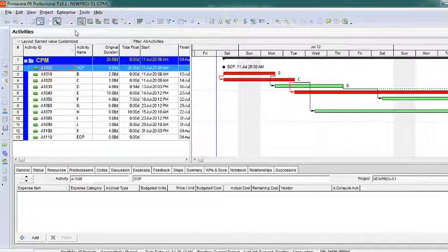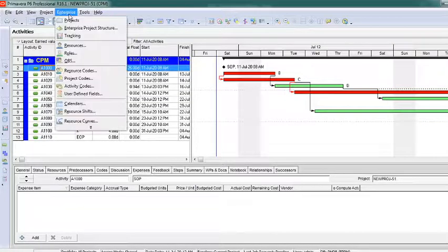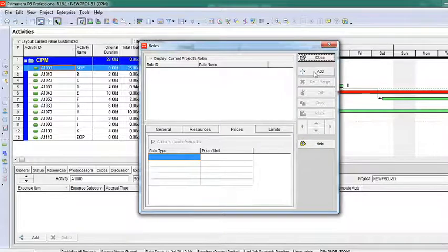Alright, so to create a role, that is very important, no? All these estimations that you have just seen, we'll have to convert to a human resource now. For example, we have seen 2 steel fixers. Now I need 2 steel fixers to be created in Primavera and assigned for that amount of work, right? So I'll go to the Enterprise menu. In it, we have an option called Roles. The moment you click on Roles, you can see there's an option called Add, right? Wherever you want to add anything, you just have to find this Add option.